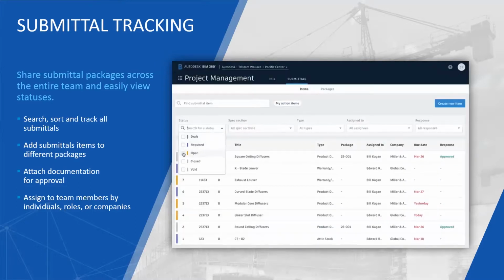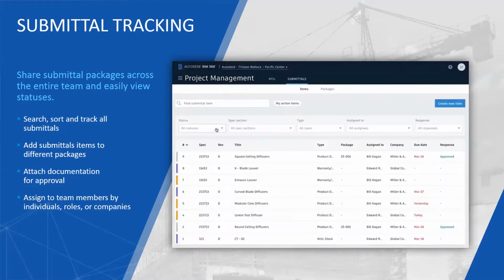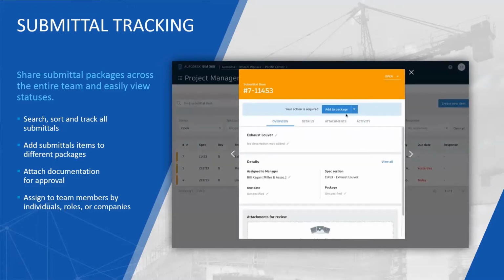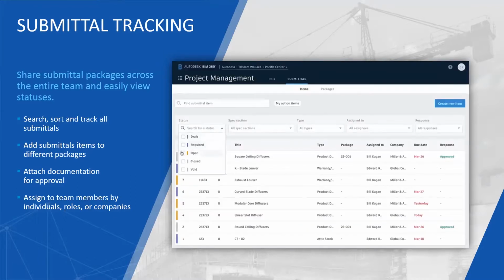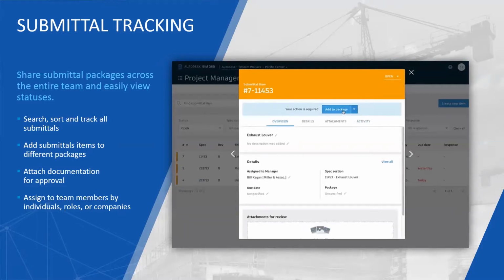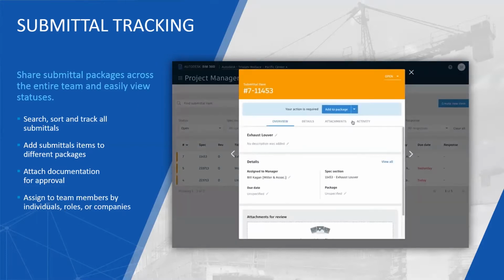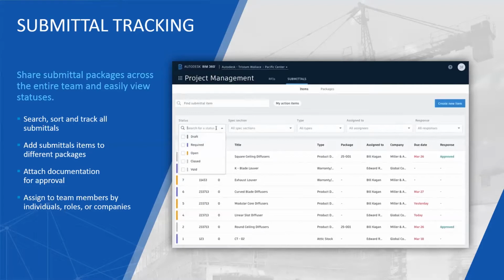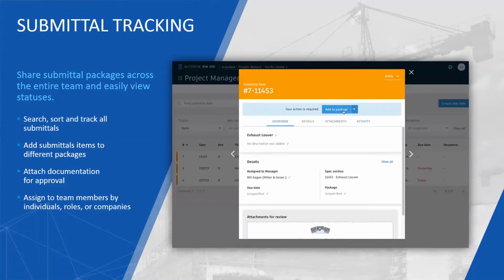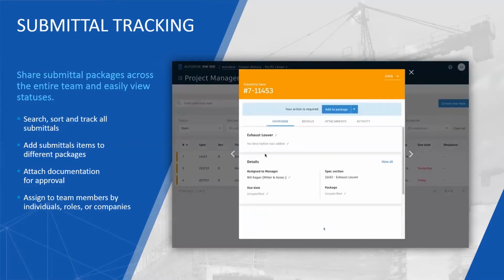However, by design, only the manager or general contractor or main contractor can review the submittal package and make the final decision on when it is ready for the design team as well. So I suppose having these flexible yet controlled workflows does help to control the handoff points within these critical processes without limiting the collaboration process, while also maintaining a single point of responsibility, so you can completely control that. And it allows you to digitize and centralize your project management workflows, as well as increasing efficiency in managing information on the job site with structured workflows and clear responsibilities as well.